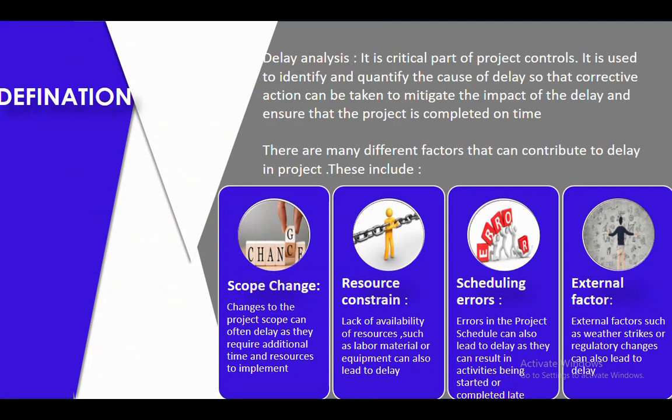Second is resource constraint. You are not able to mobilize, or there is a lack of availability of resources as compared to the original plan. That will again be a cause of delay, because if you are not able to mobilize enough resources as per the original plan, definitely it will take more time, so it will delay the project. On the other hand, suppose you mobilize the resources as per the original plan, however they are not productive, or there is a breakdown in the resources, that again will cause a delay.